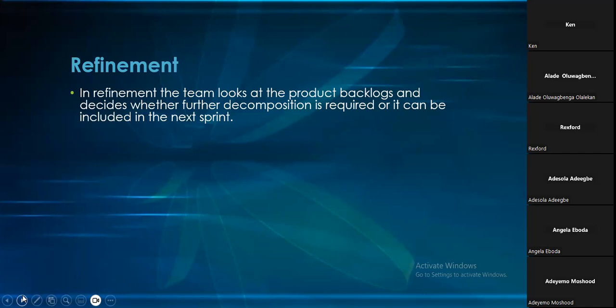So if we say we want to do maybe a landing page, okay, let's break it down to the header, the footer, this one, that one, we'll break it down. So in that refinement, we break down stories to be sizable, to meet INVEST criteria. INVEST criteria will be a second assignment for you guys to look at what INVEST criteria is.